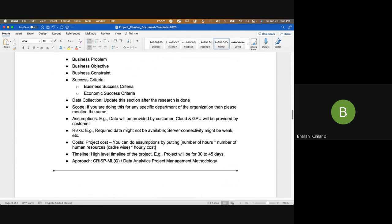If the client provides the data, that's called secondary data. You also need to mention the scope — whether you'll do it for the entire organization or only a specific department. Assumptions should be listed: for example, data will be provided by the customer, cloud will be provided by the customer, GPU will be provided by the customer.